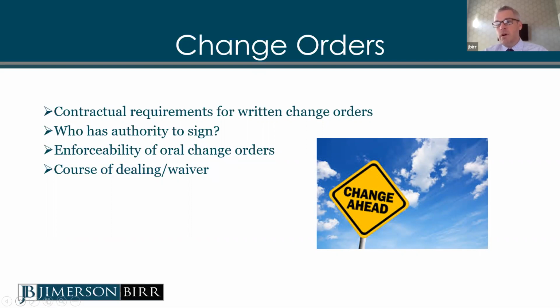Or even though the party authorized the work to be done, it wasn't authorized in writing, which is what the contract required. So they argue that they don't have to pay for that work. So just be careful, understand what needs to be done in order for a change order to be enforced. I realize that in fast-paced projects and the day-to-day world that we live in, it's not always possible to get all the I's dotted and T's crossed when it comes to change orders, but you need to try your best.